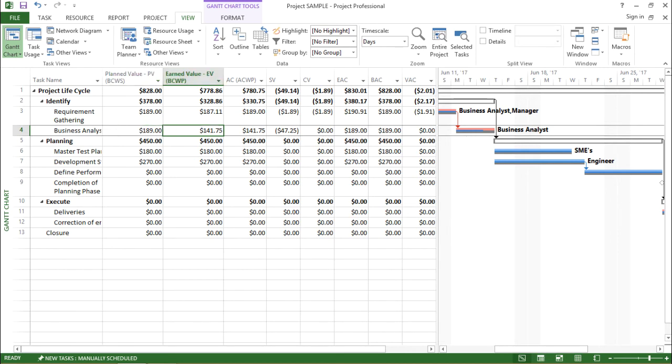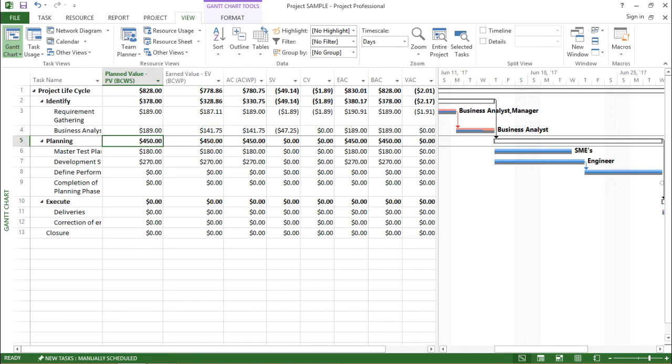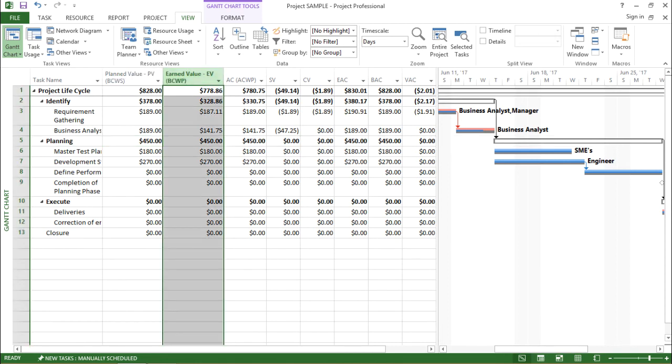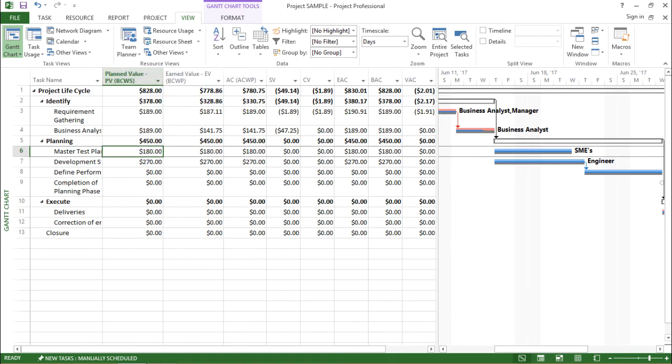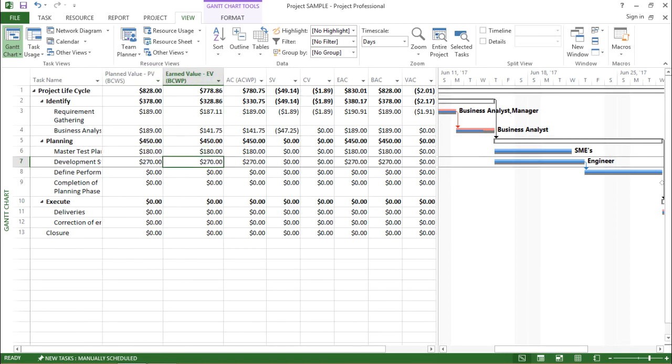The earned value says it is $141.75. So for the tasks which have been completed 100% for those tasks, planned value and earned value will be similar as you can see on the screen.